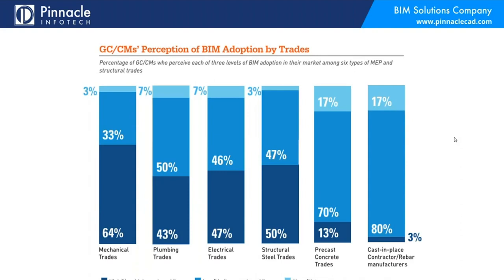We did the same thing with GCs, asking: in the markets you operate, when you want to bring on a trade, do you have trades that come ready to play BIM? Mechanical trades were the strongest — almost two-thirds report no problem. It drops off with plumbing and electrical, and surprisingly with structural too — only half said they had people readily available. It falls way off when you get to precast and cast-in-place — an area where the industry needs to help those contractors get better at using models.